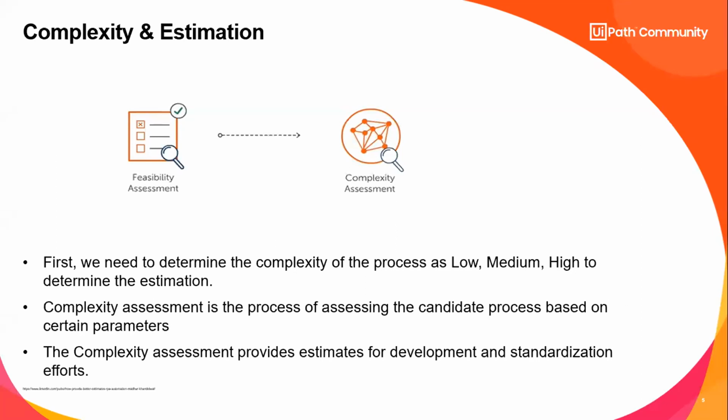This complexity assessment provides the estimates for our development and standardization efforts, that is, the time that will be required for development and the time that should be required for standardization. By standardization, as I mentioned in my previous slide as well, we always try to re-engineer or standardize the process before we go ahead and automate it.